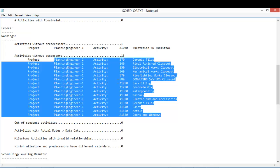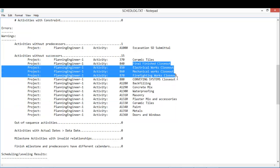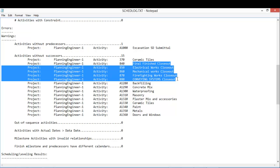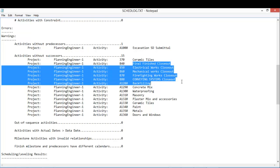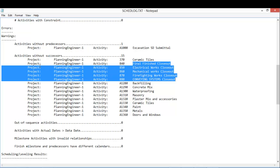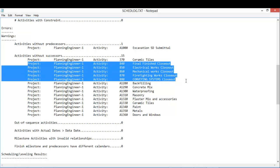In the case we have too many activities, something like closeout or testing and commissioning, you can make another activity and call it project completion date, a milestone, and link these four activities to it. This will relieve you from leaving the four activities with open ends.